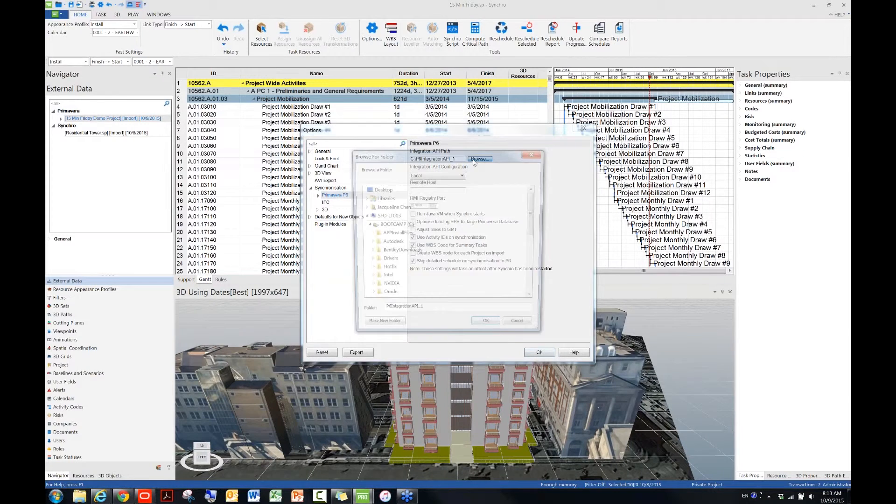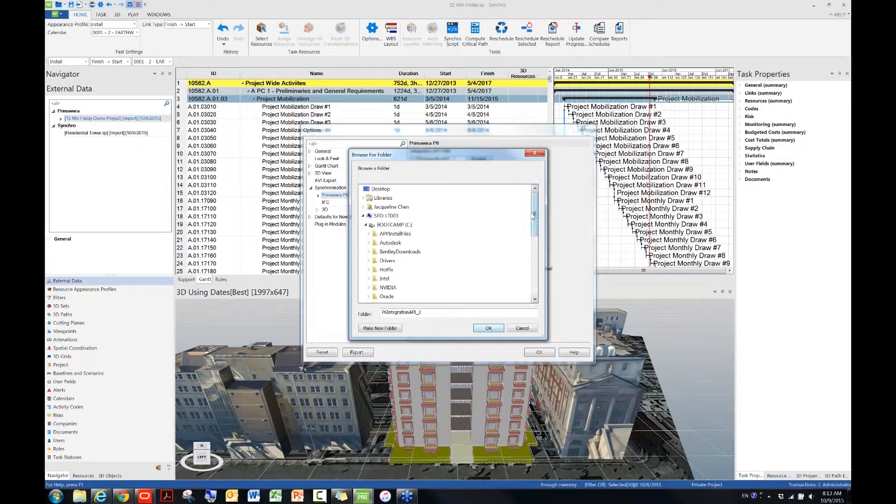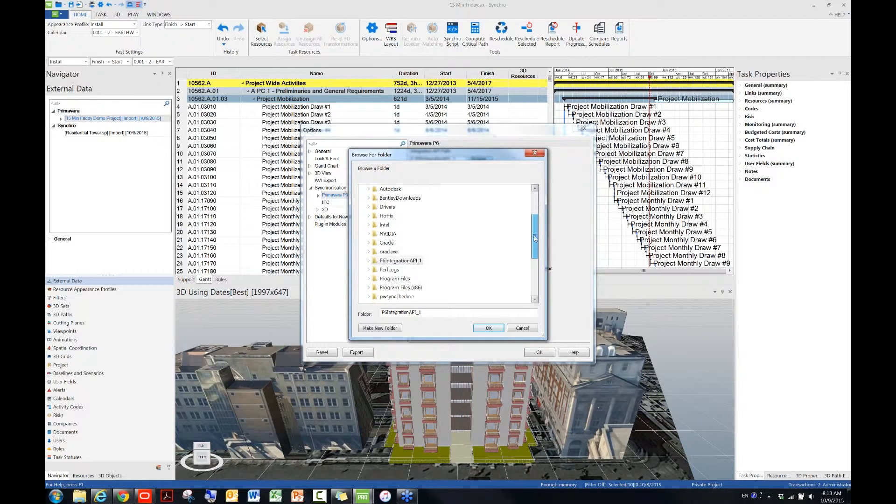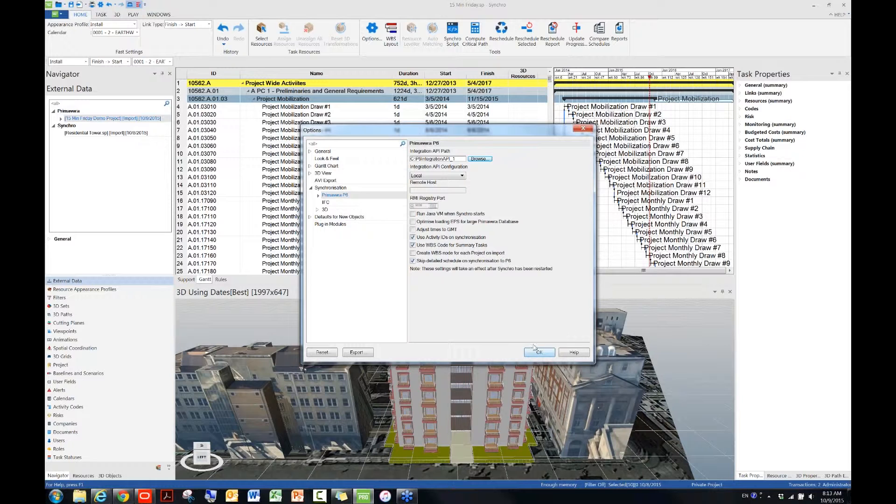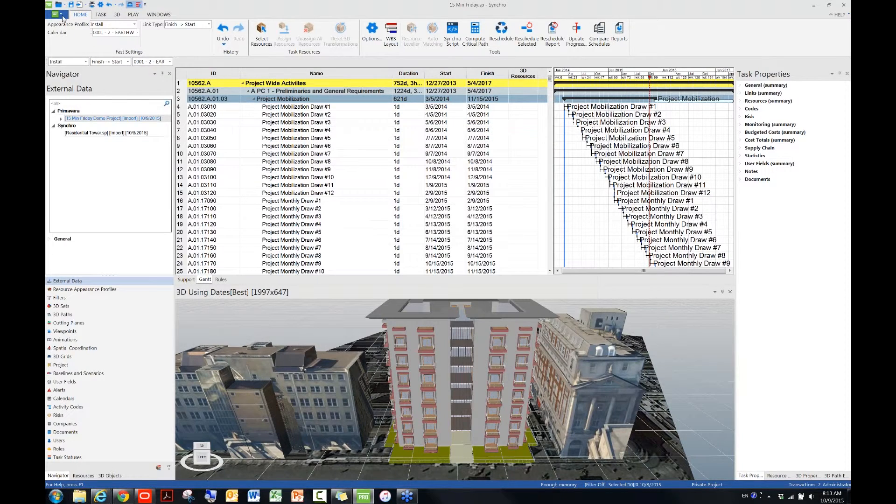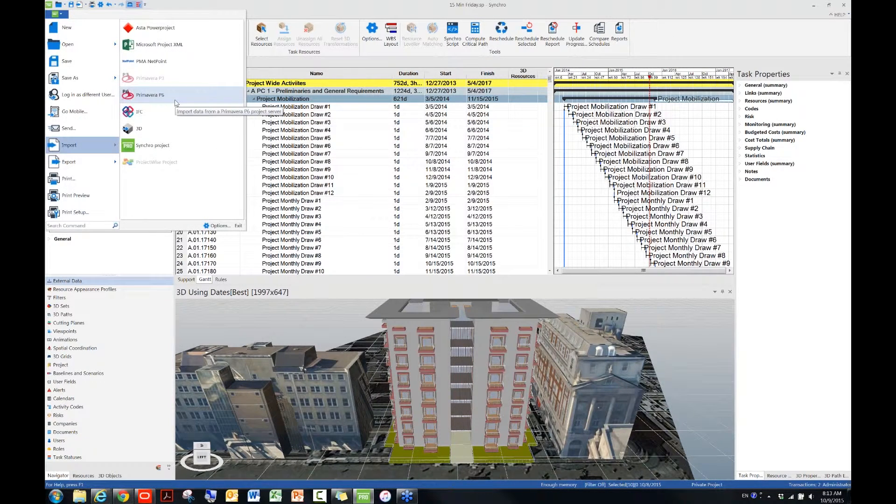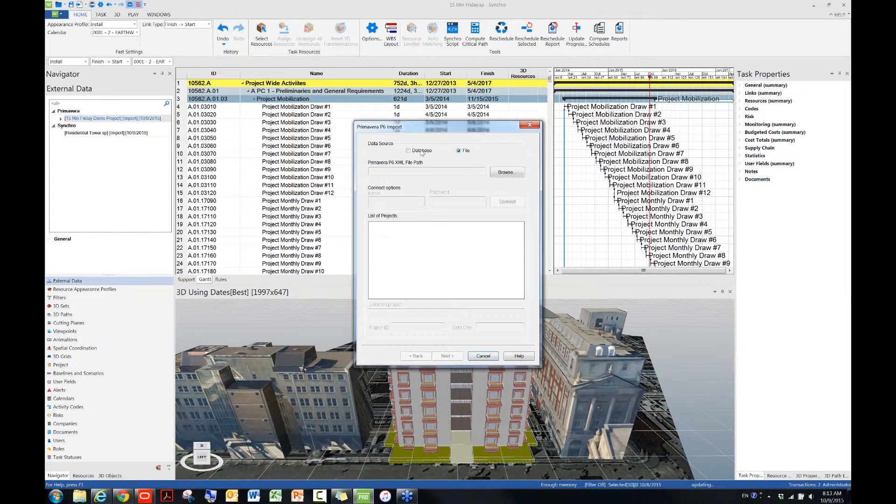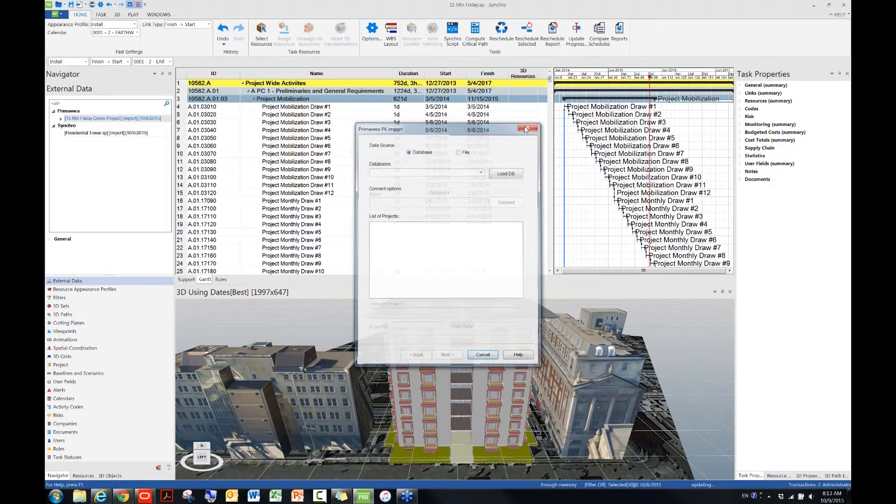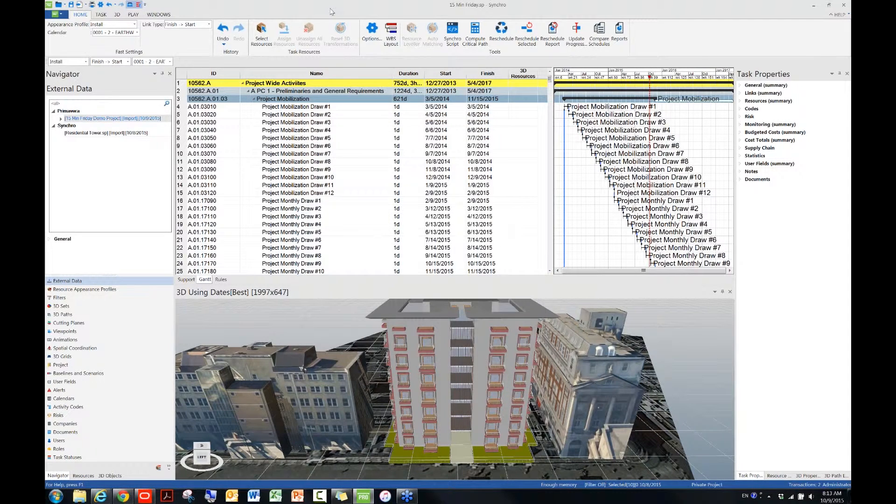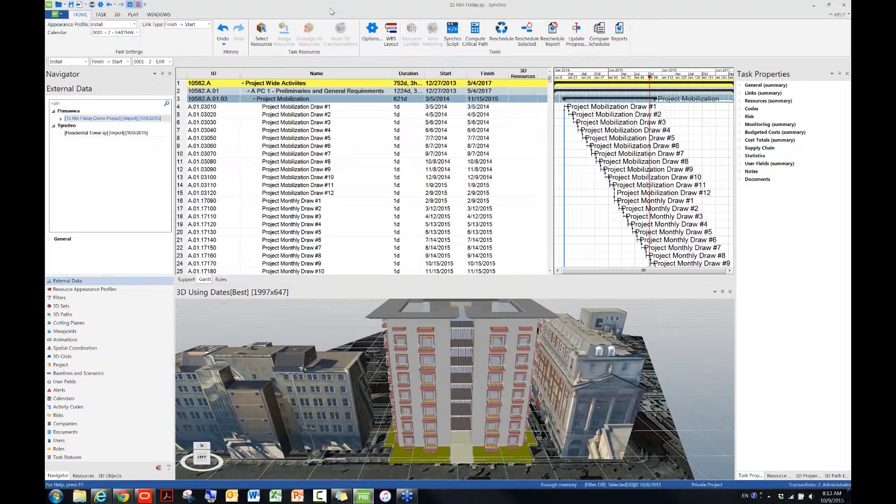So you would just simply browse to, in most cases it'll be your C drive, and then browse to this folder, and then hit OK, and then hit OK to apply the change. Basically, after that, you should be able to bring P6 data successfully into Synchro, because Synchro can now connect to P6 PPM installed locally, or P6 EPPM remotely via the P6 integration API, which have been installed and configured on the local machine. Please note that both the P6 and API must be the same version, and the API configuration instruction can be found in the Synchro Help.